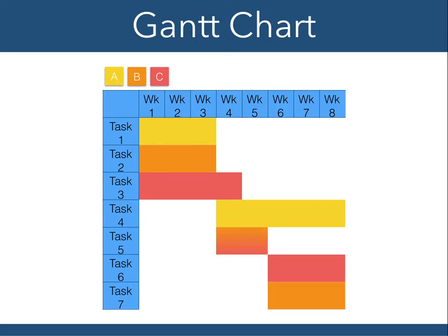Now, in many senses, the simplest solution is what I've sort of shown here as a gradient, which is this task 5. So, person A is off doing their own work perfectly happily, but here for task 5, you say, oh, well, can B and C work together on this? Well, maybe they can, and if they can, that's great, and then they go off and do their own 6 and 7 tasks afterwards. But sometimes they just can't. Sometimes it's just not efficient to try and do that. Sometimes you don't really have two people with overlapping skill sets and things, so you can't always rely on that.